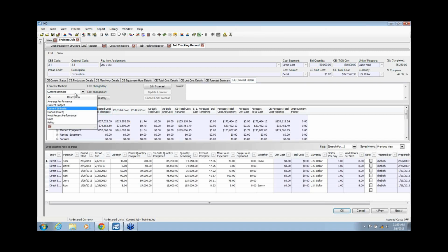Hard Dollar's done some ginormous things in the last 12 months with flexibility of how I want to reforecast that data from a manual forecast perspective, using the latest entries, using the historical part of it, using the average, using the last entries. So now I can kind of drive a lot of flexibility as to how I want to future forecast the information, and then toss it back, the opening graph we had, over to the ERP system, toss that information to ERP so they can roll it up into the budget.